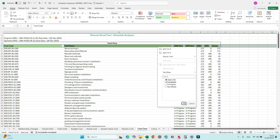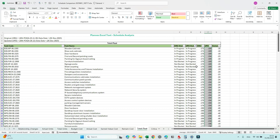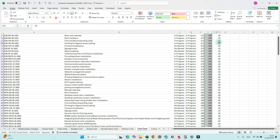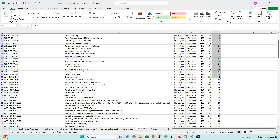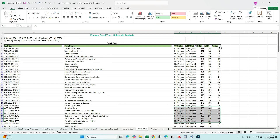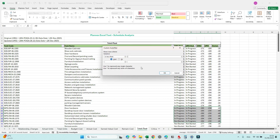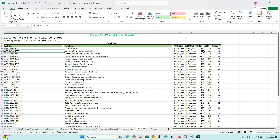Total Float: if we filter by completed activities, of course their float should be zero, which is fine. For activities that are In Progress or Not Started, we notice total float has increased by more than 30 days. Within a 30-day update period, a total float change should be within 30 days. Anything over 30 days may indicate a change in remaining duration. We can filter for changes less than minus 30 days — all of those activities need to be checked, as one delayed activity may be driving the others.